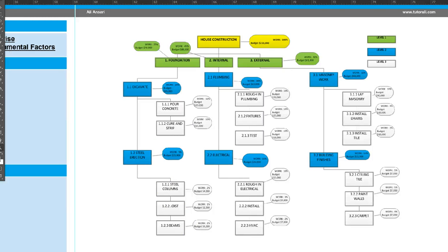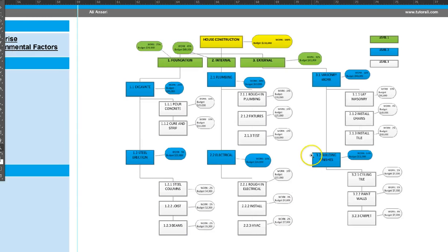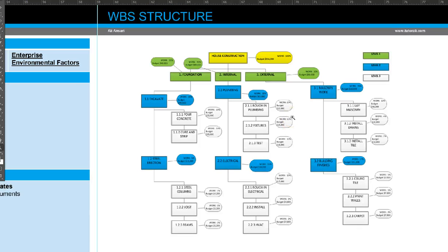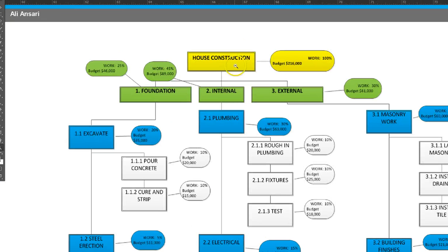So that was a description of the work breakdown structure — why it's important and how we create it. The technique used to create it is called decomposition: I started with the house construction and broke it down into different levels, then took the foundation at level one and decomposed it into level two to show what needs to be done — breaking it down into smaller, more manageable pieces.